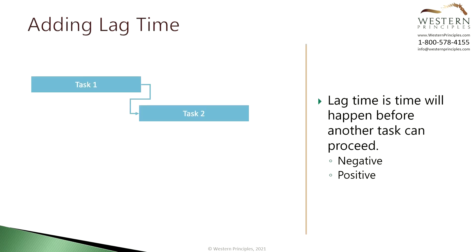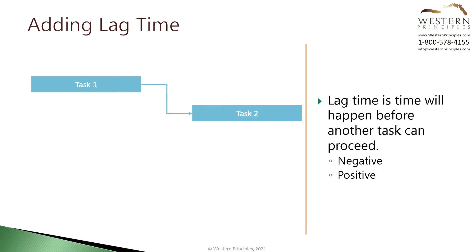Lag time is best described as wait time that's expected to happen before a task can begin. Lag time is normally accounted for in the duration of a finish-to-start relationship. For example, if you painted a wall and the paint was going to take eight hours to dry before you put the second coat on, you might put this in the relationship between tasks as lag time of eight hours. This pushes the next painting task out.